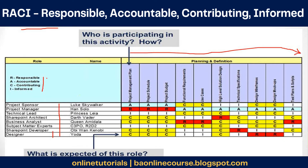Let me explain each of these roles. Responsible means he would own that task. He has to make sure that that particular task is completed on time and without any major issues. If there are any problems, he has to ensure that all necessary actions are taken to correct it and ensure it's back on track. He is the primary person who should ensure the task is completed. If something goes wrong, his head is on the block — he would be the first one held responsible. That kind of role is called Responsible.